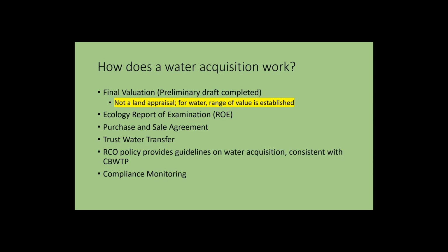Ecology does a report of examination. We're fortunate in this proposal and in the previous one that there has been a lot of work done to get to this point. So we're very comfortable with both proposals about moving into the report of examination. There's a purchase and sale agreement, and then the water gets put into the trust program.